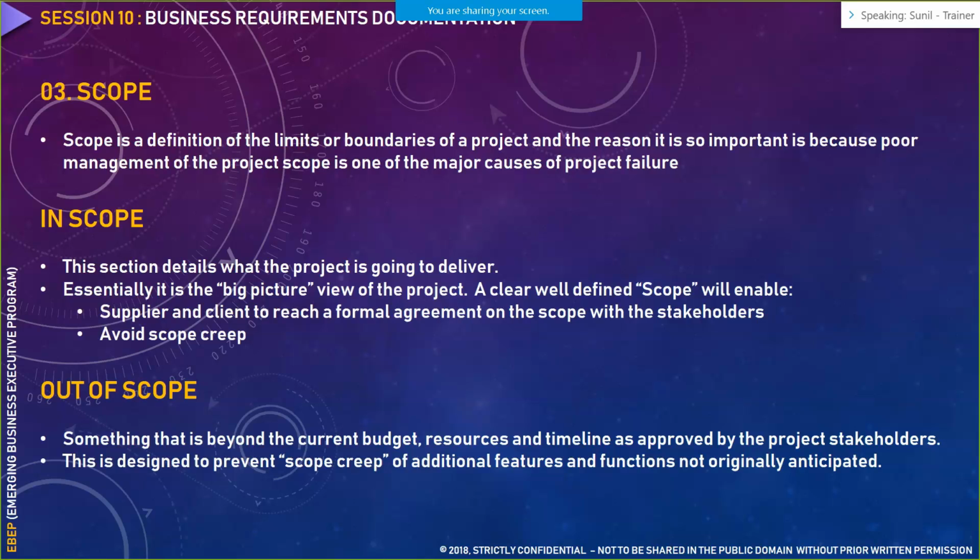Now if there are any issues pertaining to the scope, if you see the business users intending to creep the scope, your project manager is the first person whom you need to keep informed regarding any scope changes. So that is something you have to do. And as a business analyst, it's your responsibility to keep the scope intact for a particular project. At any given point of time you feel that the customer is trying to creep the scope, reach out to your project manager.